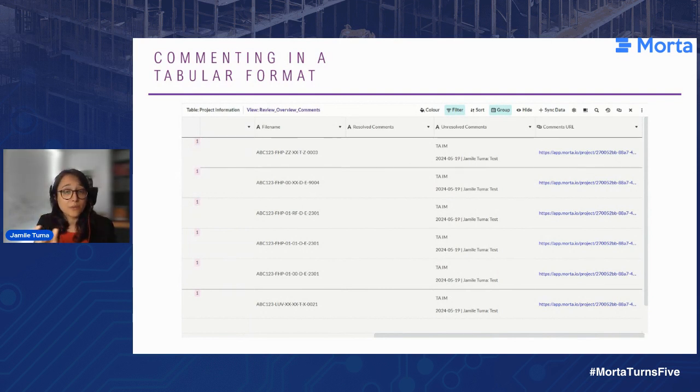They will be organized by the discipline, what was the date, who was the individual who raised that comment, and what was the content of the comment, right? With that, we can easily get a CSV file, share that with the contractor, and keep addressing those issues. Once the issue has been addressed, we would resolve that comment, and then it would jump to the column on the left, resolved comments.